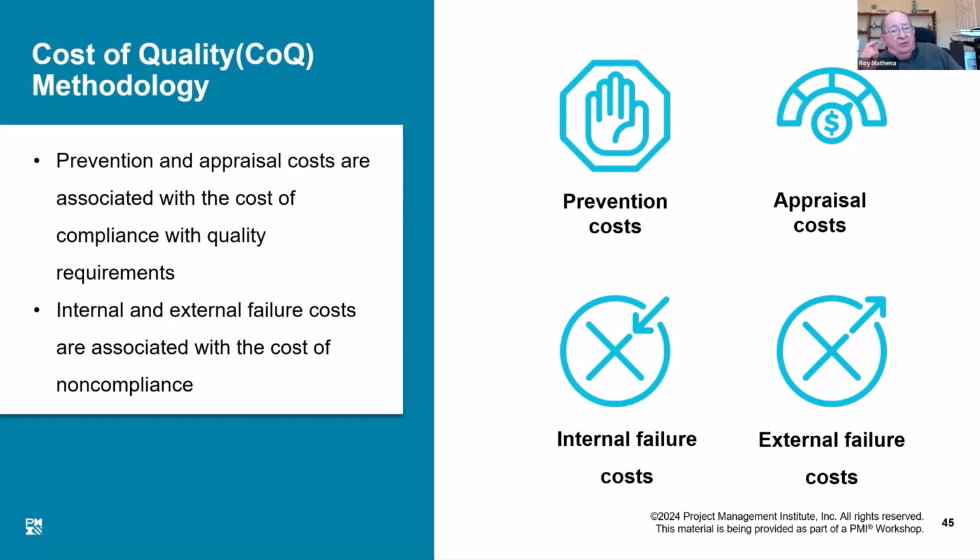Appraisal costs are incurred to determine how well you're conforming to quality, how well you're meeting the requirements. We may be measuring and monitoring activities related to quality. We may have quality checkpoints. We may have specific tests we do, and so forth. These costs may be associated with evaluating even purchased materials, processes, products, and services, to make sure they're conforming to specifications.